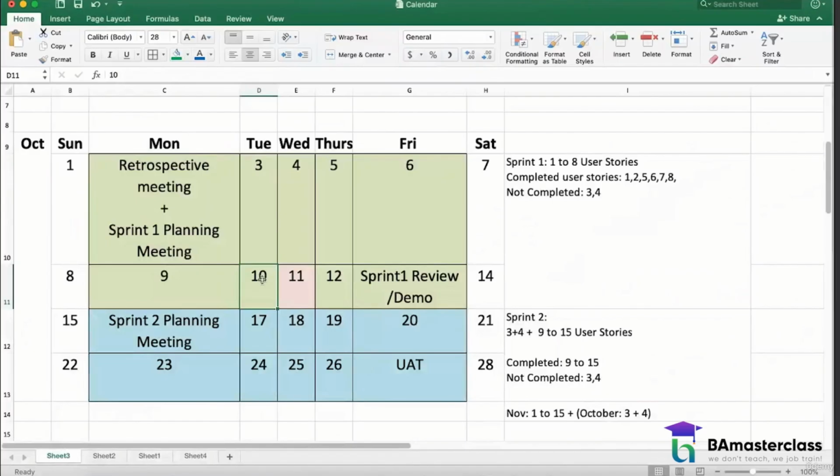Somebody has to resolve that defect. Now, do you wait until the 28th to release that solution for the defect, or do you have to deliver that immediately? What's your answer? Immediately. You cannot wait, right? So you have to do another release to deliver that solution, and you cannot wait until the regular release cycle. In such a scenario, the release is referred to as a hotfix, HOTFIX.